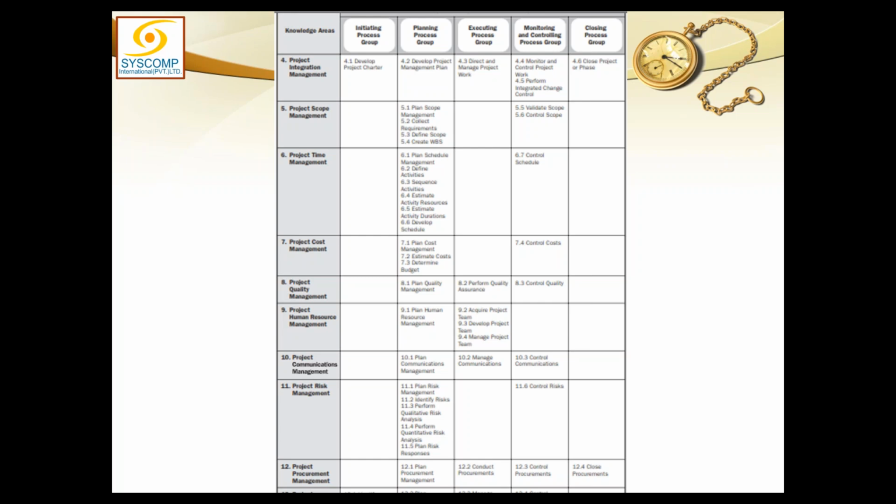Actually, what happens is, whatever these human resources perform, that will be work, and that work performance would be sent as data to monitoring and control, which will analyze that work, not the human beings, but the work they have done. And if the work is not done right, then naturally some change request will be moved and that report will be sent back to execution, the work performance report, that that specific work was not done well.